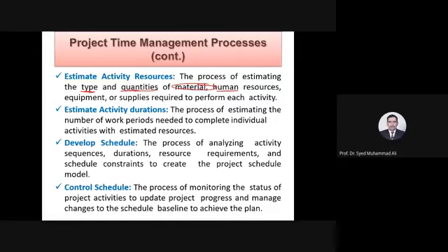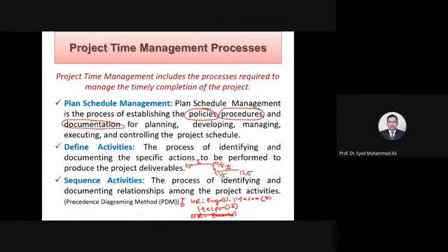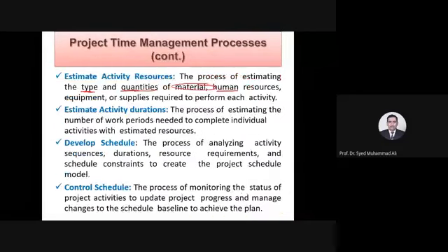Or supplies required to perform each activity. Now, we said excavator is required. So you can put that you will need petrol or diesel, for example, 1,000 liters, for example, for undertaking this assignment. So when you estimate these resources, you assign them to those activities actually.